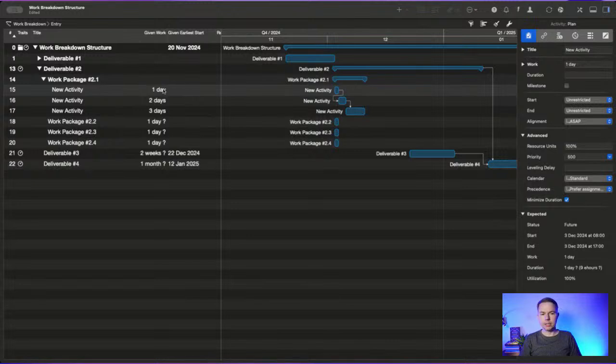You can estimate it in effort, how much effort it will take. So if, for example, it is 10 person days of effort, it means that one person can work on this task for 10 days and most probably they will finish it. At the same time, it may mean that you can assign two people to this task and they will do it maybe in 5 days, maybe in 6 days, calendar days, I mean, or working days, which is more important.